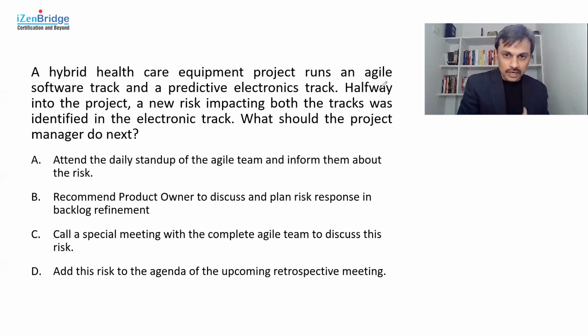Attending the daily stand-up of the agile team and informing them about the risk is a good idea. It is not that bad, especially if the risk impacts the current iteration. But if the impact is not on the current iteration, then there is no action coming out of that particular conversation, because you spoke about something, but probably we need to handle it somewhere else. So we flag this option and see if we have a better option available.